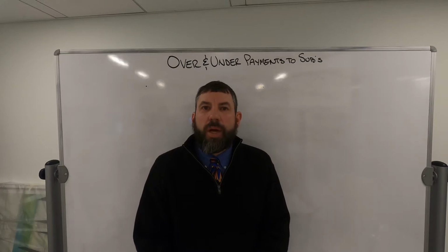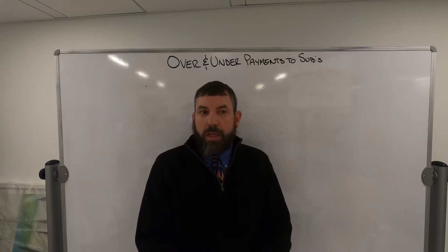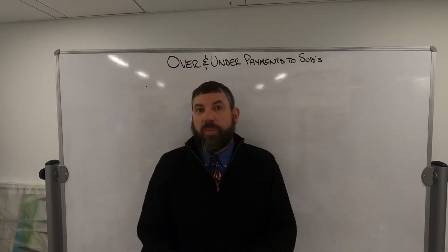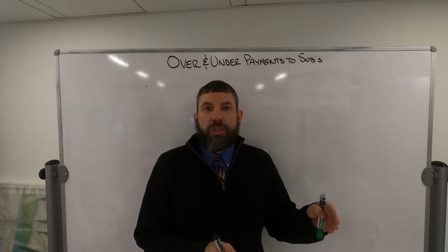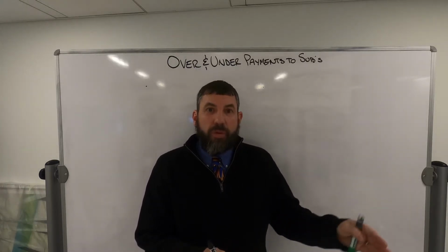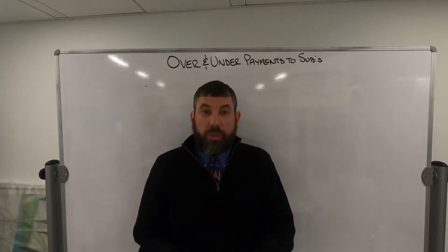Today, we're going to talk about over and under payments to subs. You hear that term periodically. Hey, is the sub overpaid? Is the sub underpaid? Trying to dive into it. In simple terms, it's related to the relationship of the percent billed on the job versus the percent paid to the sub.